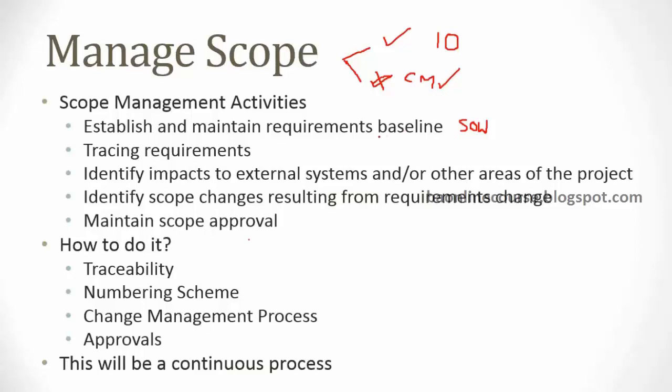For doing this, make sure that you agree onto the baseline document. Right? So during your requirements phase, the SOW is the baseline document. When you're capturing the detailed requirements, SOW will become the baseline document. After the BRD is prepared during the requirements phase, and after the customer signs off the BRD, then BRD becomes the baseline document. If something is there in the BRD, then it's delivered. Otherwise, it has to go through the change request. So your point of reference is a BRD now. So the baseline is a BRD document.